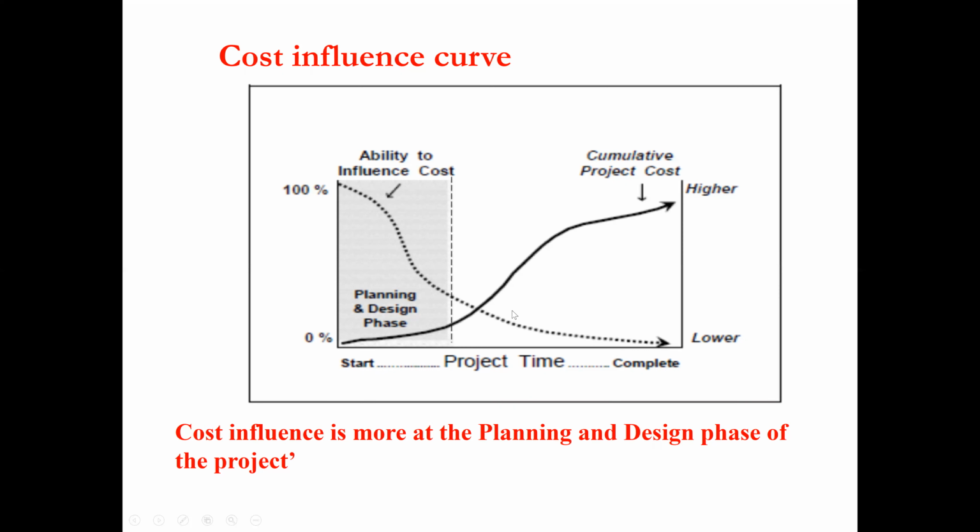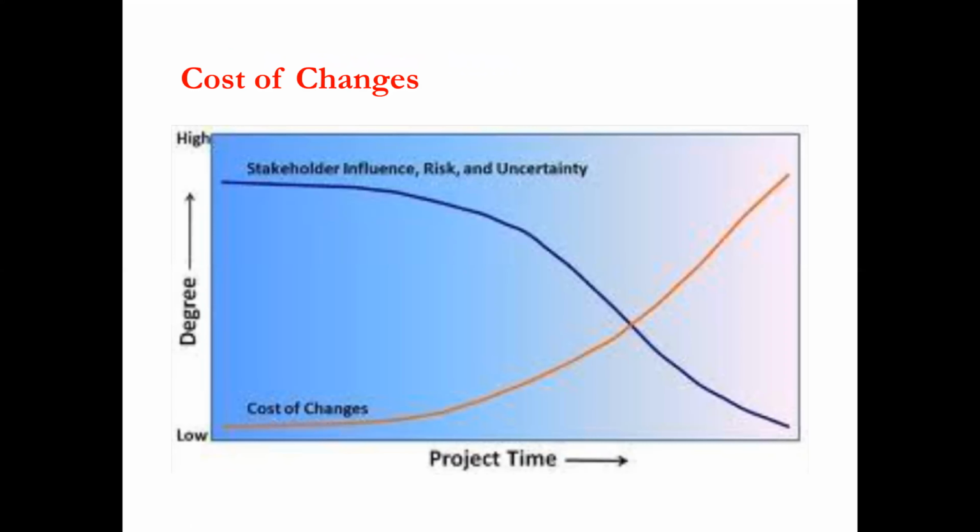As we move forward towards the completion, our ability to influence the cost of the project is going to reduce. So cost influence is more at the beginning and design phase of the project. And similarly here, cost of changes. Cost of changes is less in the beginning.